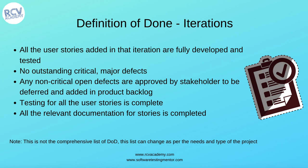You shouldn't have any outstanding critical or major defects for any of the user stories you have picked. If there are any non-critical open defects, they should be approved by the stakeholders to be either deferred or put into the product backlog to be looked at in later iterations or cycles.